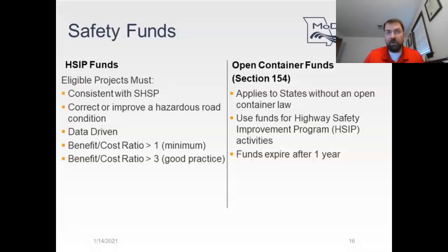Now, thing to note with open container funds is that those will lapse after 1 year. So if you've got a safety project that's using open container funds, and there's a change in scope where we don't necessarily need all those funds, we need those funds shifted to a different safety project to ensure that we do not lapse on those funds.